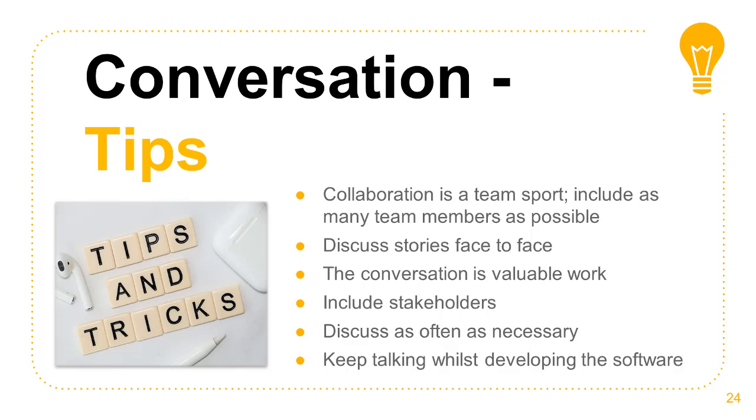Sometimes you'll need to discuss user stories a number of times. In my experience, it's worth having a number of user stories being discussed at any one time. Some of these will be vague stories that the team are just beginning to explore. Others may be completely ready. It often takes more than a couple of attempts before a team is ready to cut code.